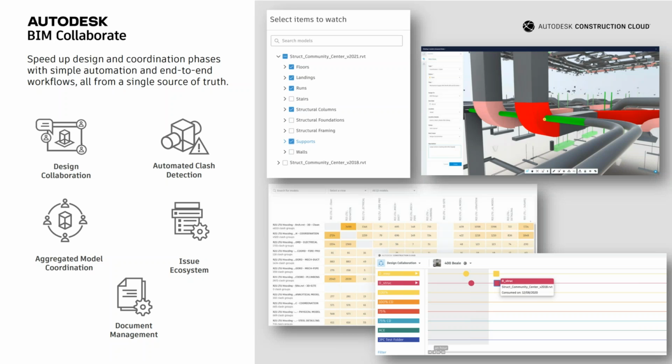They're just not the ones drawing the walls, putting the windows in and doing that work, but they're doing everything else. So that gives them full transparency into the packages and the swim lanes that you see, and the project timeline for distributing models to the different teams during the design phase. They have full visibility and the ability to do the clash detection, manage it, and monitor it to make sure that all our trades are coordinated. So things like that pipe going through the ductwork in that image don't happen, right? And it's about making sure we collect everything, even identifying assets to be part of that.